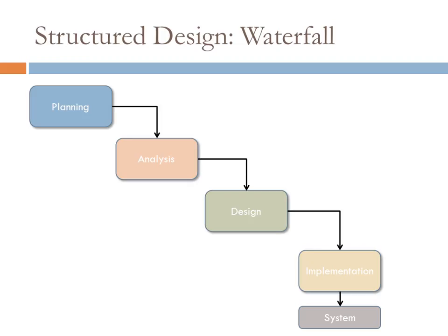Right, so these actually fall, you can almost think of them as falling along a continuum from very structured to very organic. Anyway, so some of the structured elements of this, one that perhaps is one of the ones that started it all as far as formalized methodologies would be the waterfall method, and you'll see this in a lot of companies even today. So this waterfall methodology essentially takes each of those steps that we talked about and breaks it out into specific sort of standalone phase of the project.